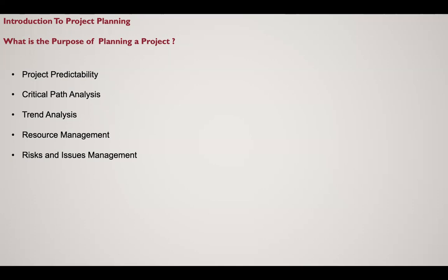When you say analyze, you need to identify all those activities that, if delayed, delay the project. For example, let's say a project is going to take 3 months. And in this project, they're refurbishing a house. They need a roofing sheet that would need to be imported from China, and it's going to take 1.5 months for it to arrive. So automatically, that item is critical. Any delay to that item might delay the project. Because the project is just 3 months, and probably you need that thing after 6 weeks into that project.